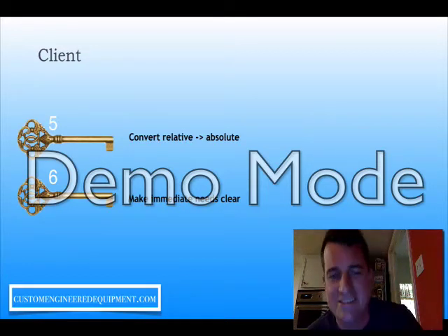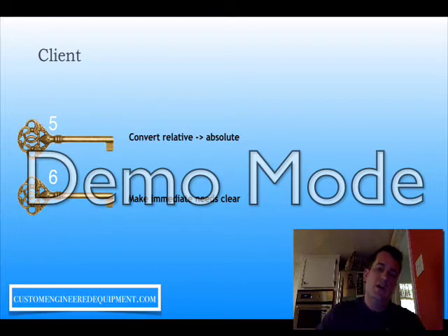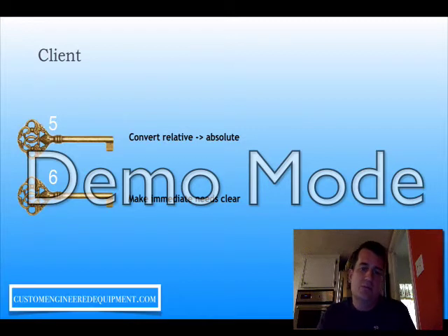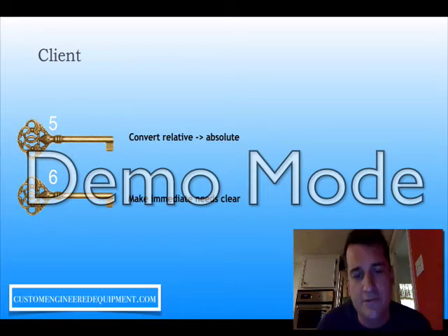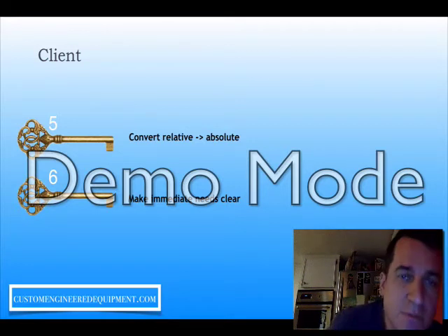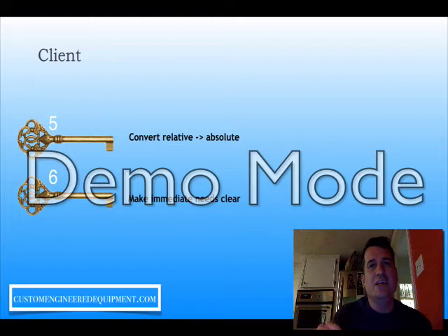So let's talk about keys to success during this phase. From the client standpoint, the engineering procurement phase is the first time sequence part of the project. So what you'll want to do is ensure that all your dates are converted from relative to absolute. You'll be surprised at how often a supplier will continue to say, oh, we'll be able to provide that 3 weeks after such and such. Well, nail down those dates, make sure that it's concrete, everybody understands exactly what's expected, when it's expected, and along the line of dates too, keys to success number 6, make your immediate needs clear.